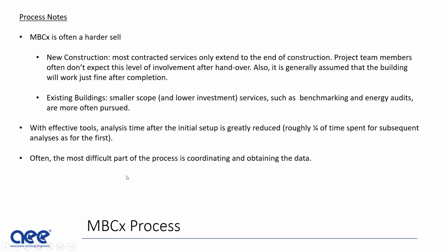We found that if you have an effective tool for analyzing data, it takes a little bit of time with the first analysis to set that up. Typically, what we've seen is a year-long set of data is optimal, so you can see the building performance throughout the course of a whole year. And it's great to break that up in quarterly segments or so to check in and make corrections before a whole year has gone by.